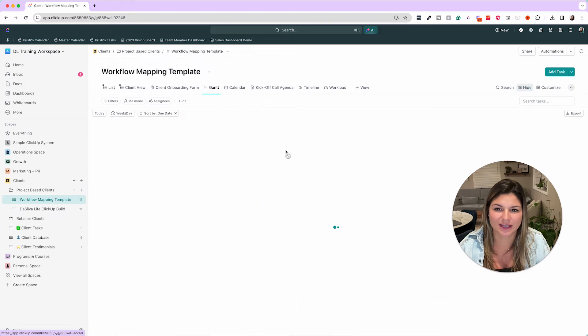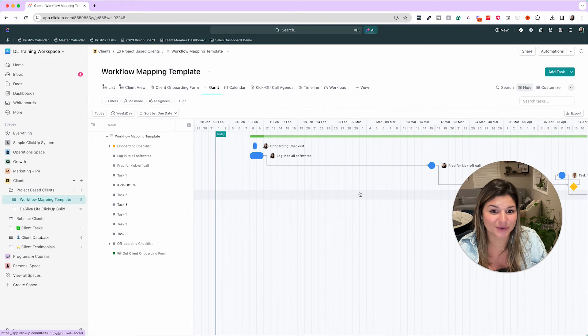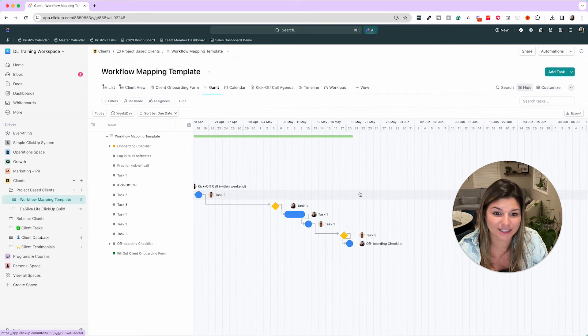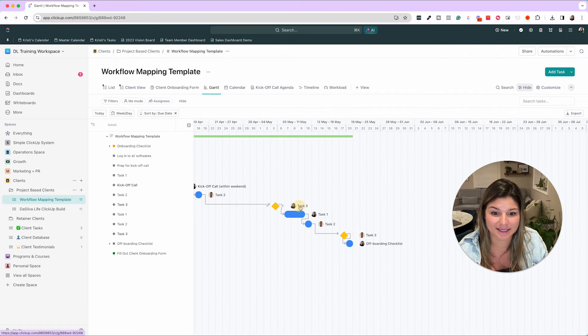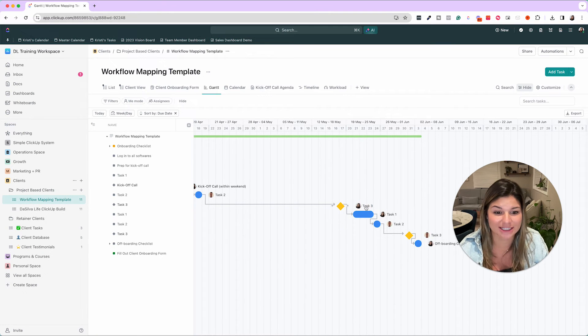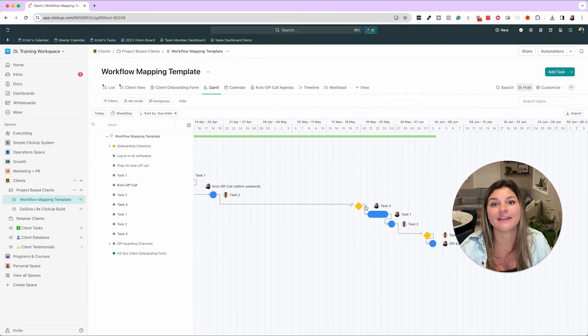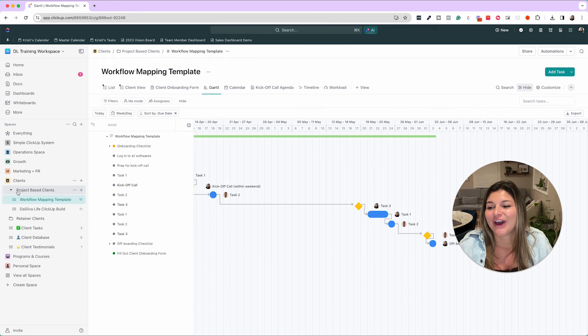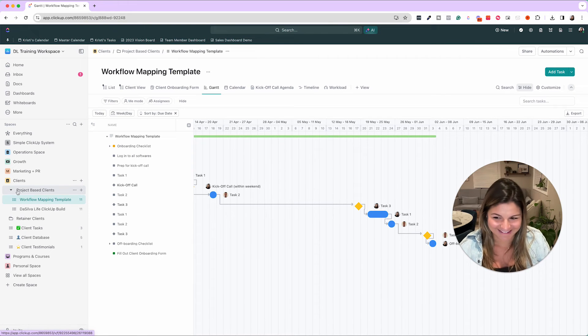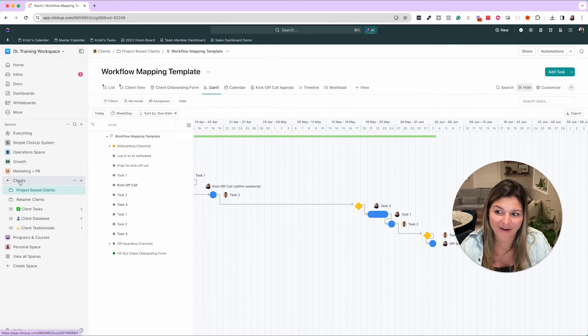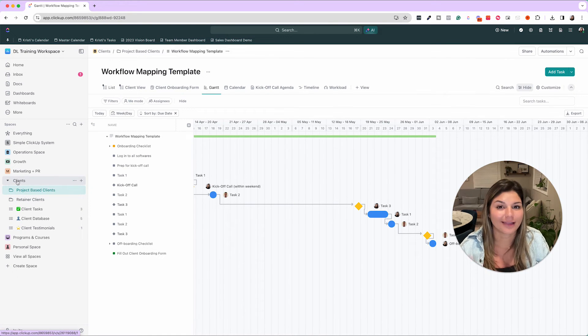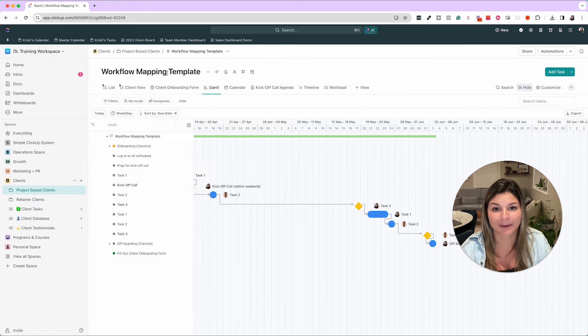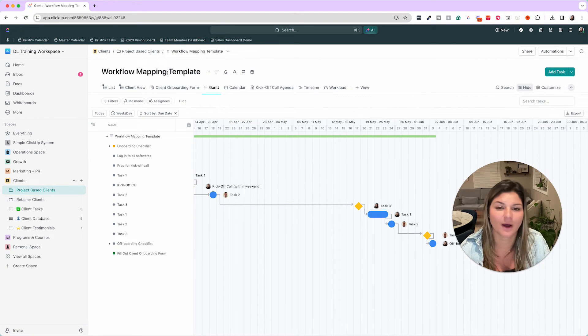Also, you can do things with Gantt view, like using dependencies. So if one piece of the project is moving, then it moves everything after it. So that's an example of client management, project management. You could also use this workflow mapping template for internal projects as well. It doesn't just have to be for clients. Then programs and courses, last one here.